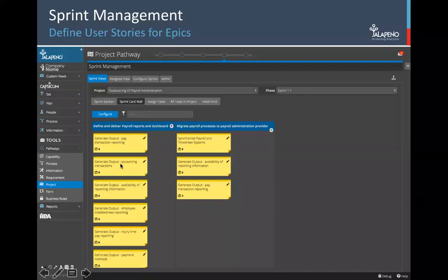Drilling in here, you just get the little view of that user story itself. So at this stage, we're just doing that very simple arrangement of user stories into their epics. You can drag them around, obviously create a new epic and add new post-it notes. And for each of those post-it notes, you can define the priority for that user story using the MoSCoW must, should, want, and so on, and a priority rating. That prioritization actually color codes the post-it notes for you.